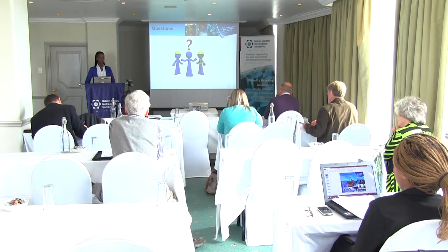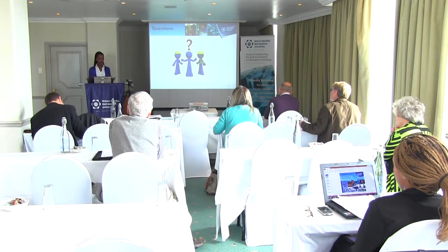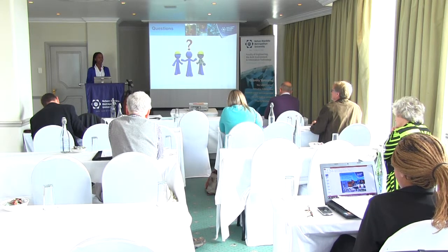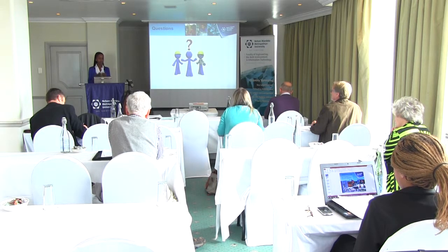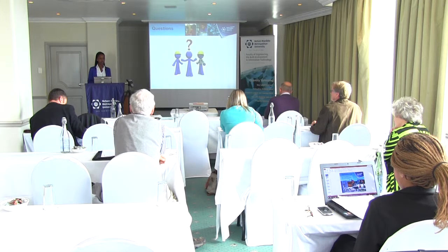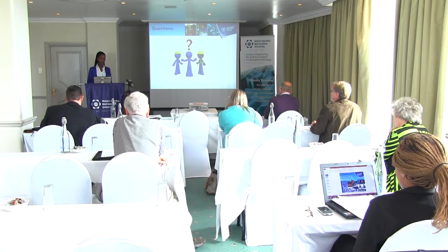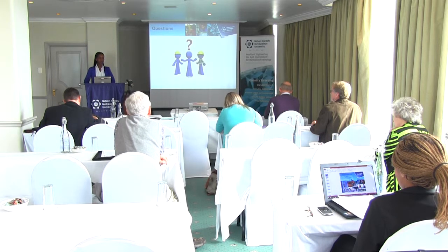Well, contractor-related issues, ma'am, include the contractor's management of the site, the contractor's financial standing in terms of being able to perform, and the contractor's experience. Very often it is found that some contractors have more than three projects running at the same time, but they want to do this project as well. That's one of the reasons why contractors are the main cause of delays. Secondly, some contractors are not as experienced as others, and for whatever reason, they might land the contract in the tendering process. Contractors, I think, are a viable candidate to be the principal cause of delay.